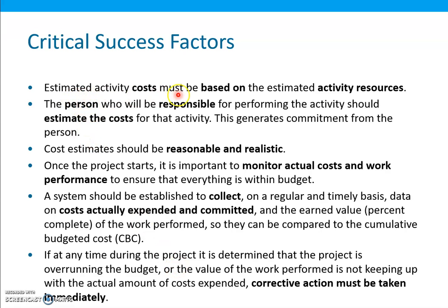Estimated activity costs must be based on the estimated activity resources. The person who will be responsible for performing the activity should estimate the costs for that activity. This generates commitment from the person. Cost estimates should be reasonable and realistic.